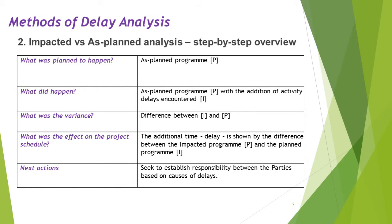Similarly, for Impacted As Planned: what was planned to happen? Again, the planned program, P. What did happen? This is the as planned program with the addition of activity delays encountered. What was the variance? The difference between I (impacted) and P (planned). What was the effect on the project schedule? Not necessarily the difference between I and P. The additional time delay is shown by the difference between the impacted program and the planned program. Next action: seek to establish responsibility between the parties based on the causes of the individual activity delays.